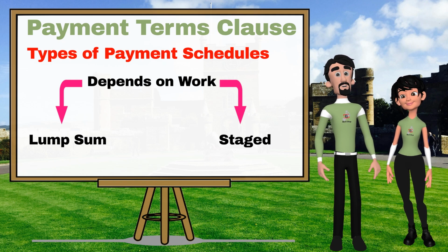In a construction project, payments might be tied to completing stages like the foundation, framing, and inspection. In SaaS contracts, billing might be monthly or annually. Freelancers often get paid upon delivery of specific milestones or final deliverables.